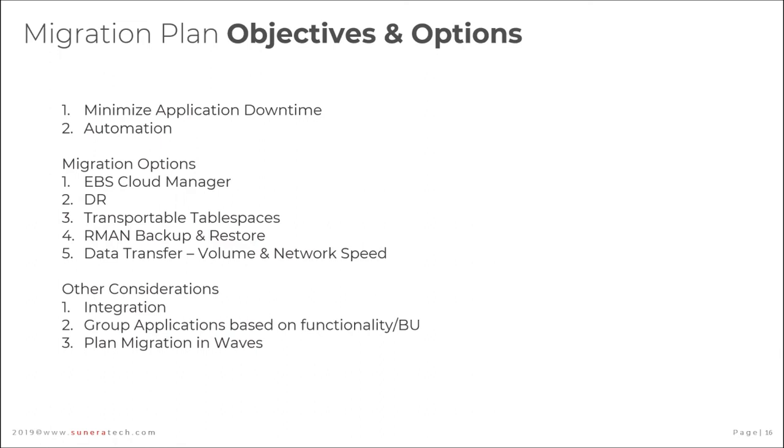So essentially, use these products, test out all the functionality, take a benchmark, identify all the customizations, categorize those, complete the migration, and identify customizations that have not been migrated as part of the initial step. You can apply them again, and typically it's creating new tables, new views, and applying new procedures. So you put the customization back again. Then you can use Cloud Tester to do another benchmark and confirm that your response and functionality are equal to what they were prior to migration.